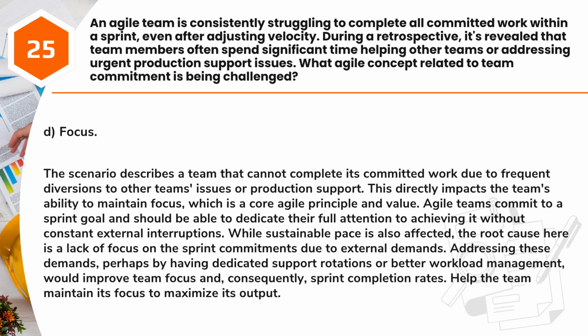Answer: D. Focus. The scenario describes a team that cannot complete its committed work due to frequent diversions to other teams' issues or production support. This directly impacts the team's ability to maintain focus, which is a core Agile principle and value. Agile teams commit to a sprint goal and should be able to dedicate their full attention to achieving it without